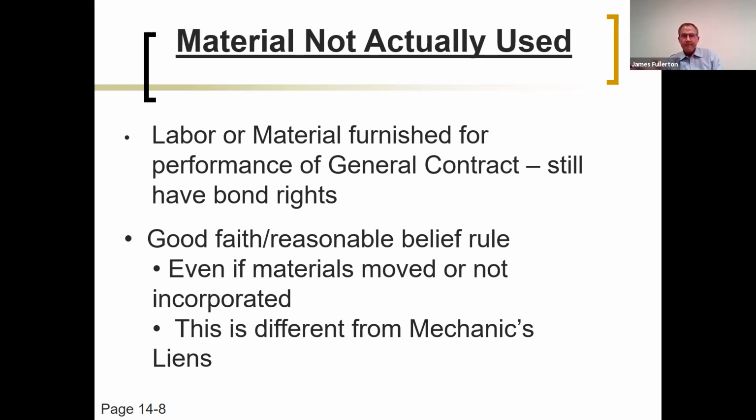The subcontractor comes in and says, well, this material is for this bonded project. And so the supplier gives them credit, but they take the materials away somewhere else. Anyway, my general contractor clients need to understand that they're still at risk of having to pay for those materials, even when they are diverted to another project.